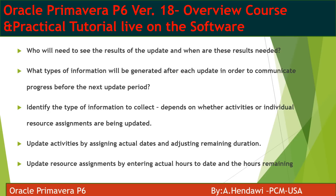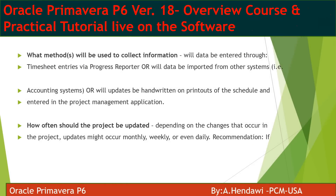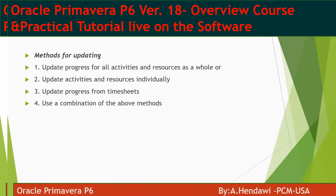Identify the information to be collected, depending on whether it's activity-based or individual resource assignment. Methods: What methods are you going to use to collect the information? Do you have a timesheet? Is the timesheet connected to P6? Or are you going to use an Excel file with information from the guys on site? Or do you have an accounting system that gives you information to update your schedules? How often should the project be updated — weekly, monthly — based on the contract conditions?